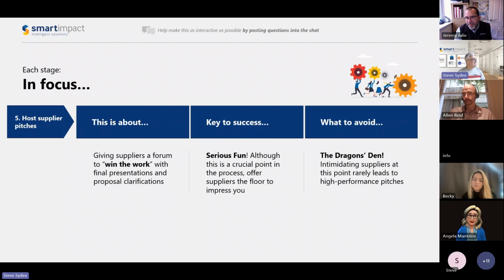I've done sessions like this when there are 30 or more people in a room, and often it's a room that's not big enough for 30 people, so everyone's uncomfortable. Most are focused on their particular area of interest, so are at best not interested and at worst bored in most of the other parts of the presentation. So if you want to involve that many people, please create breakout sessions that are relevant for those people, and then just have your core team in the main presentation.